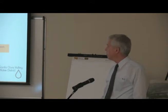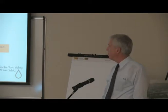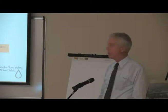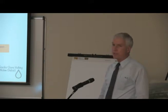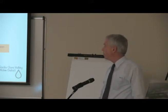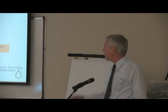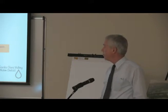It took hundreds of hours, thousands of dollars, and some really talented geologists and geophysicists to get to where we are now, that we have the certainty that the foundations of the buildings we're about to design don't need to be specially designed to bridge a fault. And we have shared information with local agencies, including San Francisco, that have had really big problems with this kind of situation, where projects they started, during the construction they actually identified fault traces they didn't know about and had to relocate facilities and essentially redesign their projects to move away from fault traces.